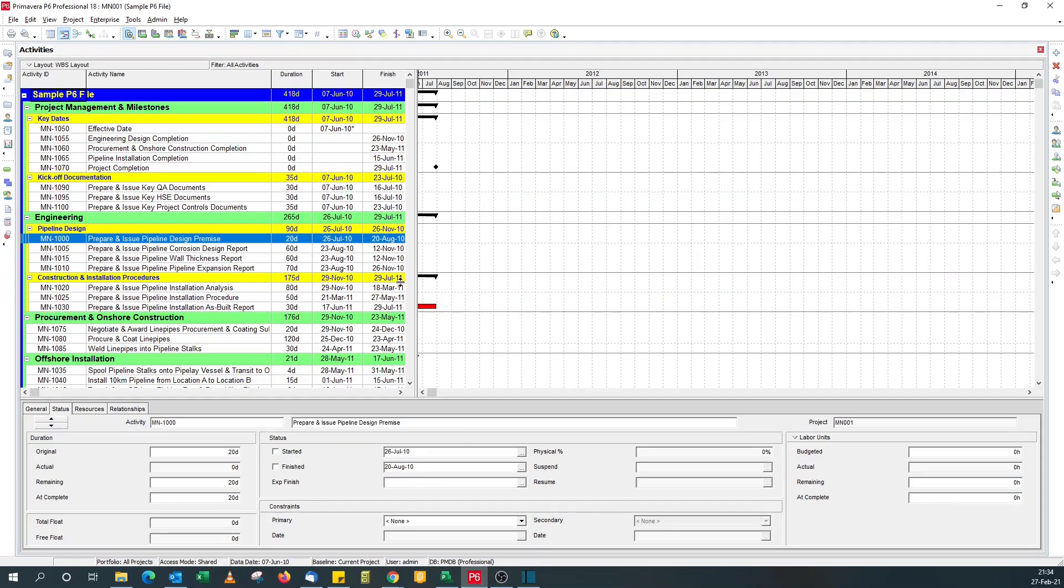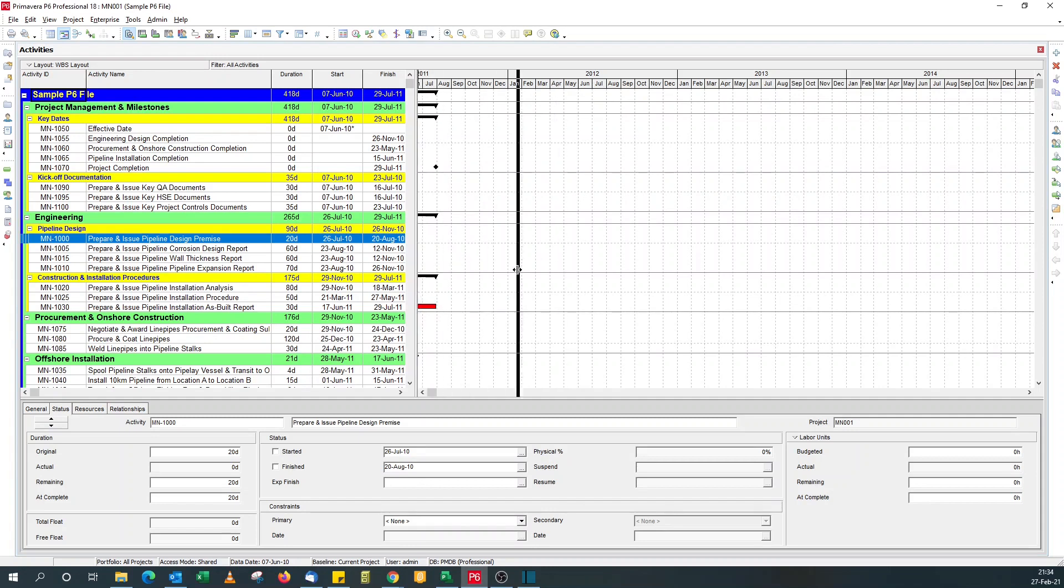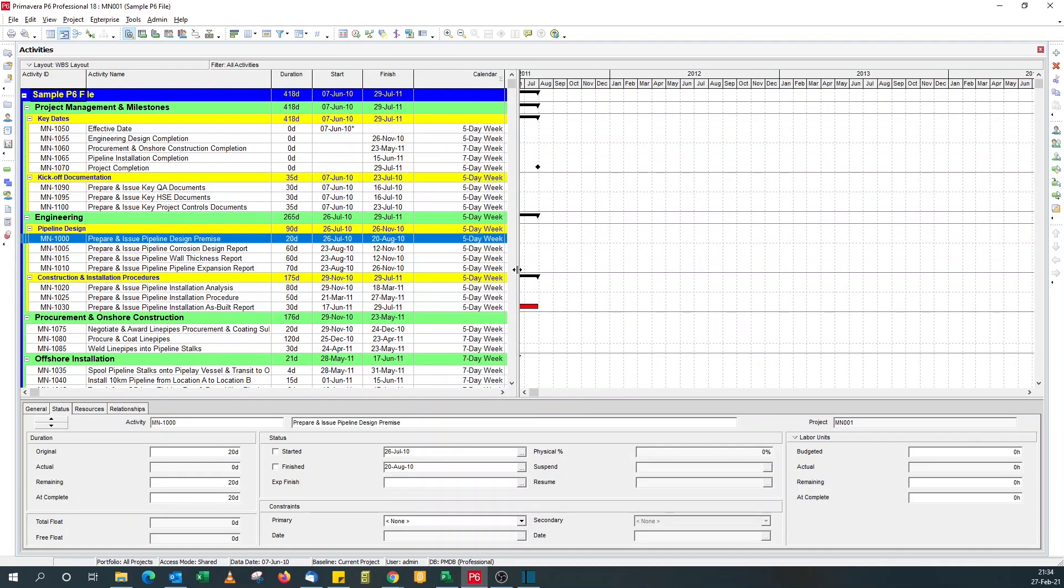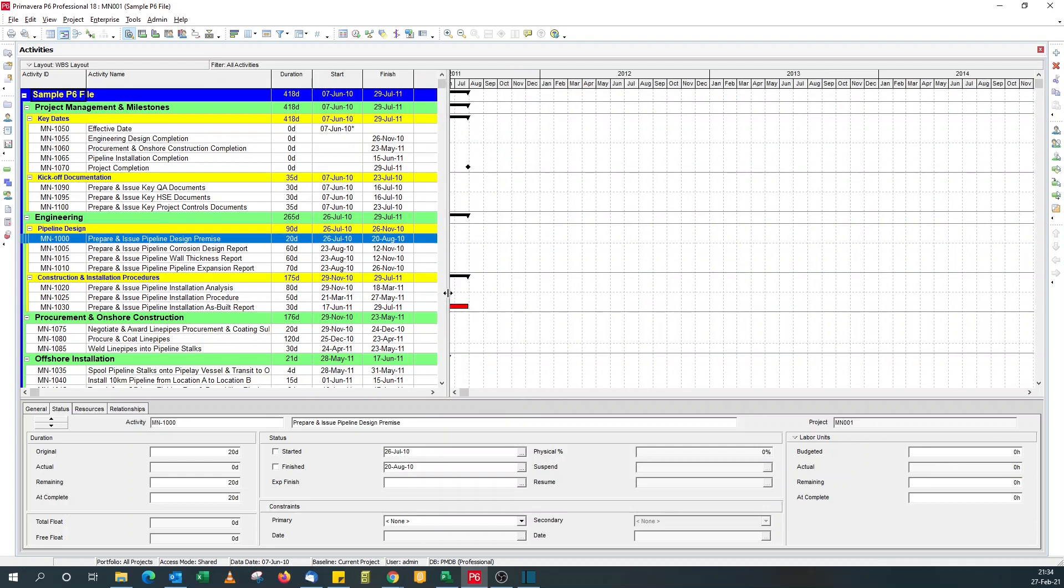Activity codes are useful for grouping activities and also for filtering. That flexibility is very useful compared to WBS. When you use WBS for grouping like I've done, it's very rigid.